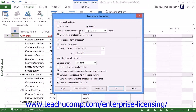Next, use the Look for Over-Allocations on A dropdown to select the basis to be used for resource over-allocation examination. Note that choosing a level of inspection that is finer than a day-by-day basis may result in many unnecessary adjustments to the work schedule, so use care if selecting a level of inspection that's finer than the day-by-day basis.